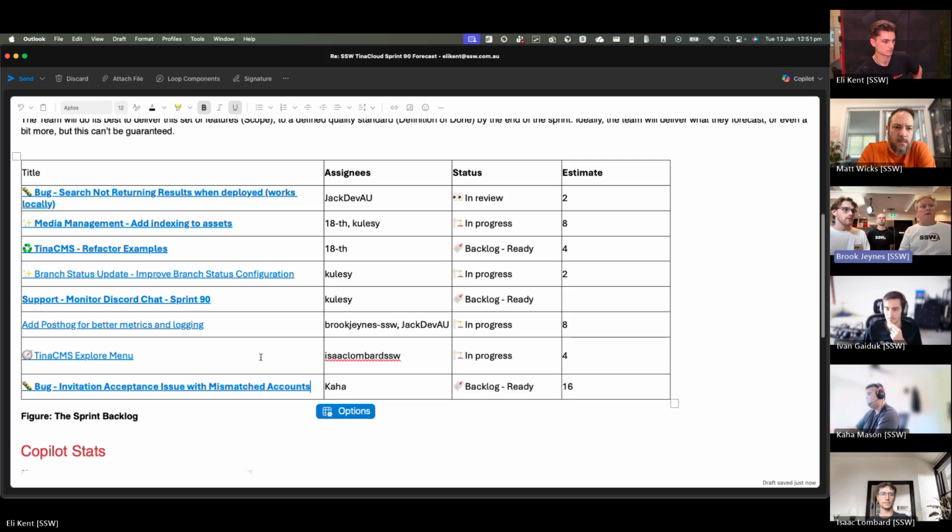Another reason we want to refactor all of these examples is that right now TinaCMS is very hard to test our changes on to make sure they actually work. By refactoring these examples, we'll have four projects that we can properly test against. Right, because right now it's just kind of finger in the wind. This looks about right. Okay. All right.